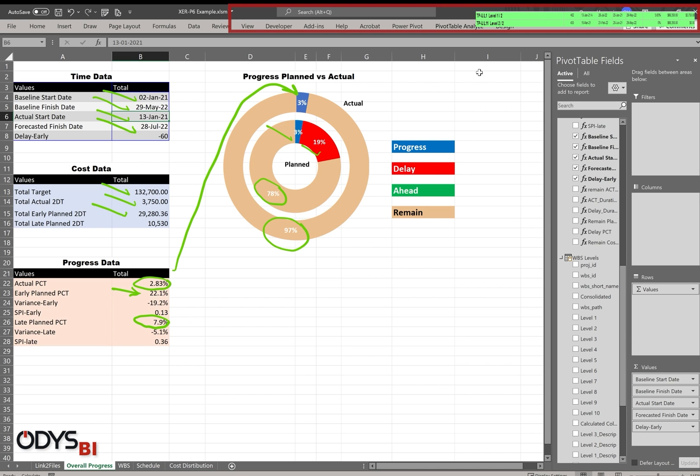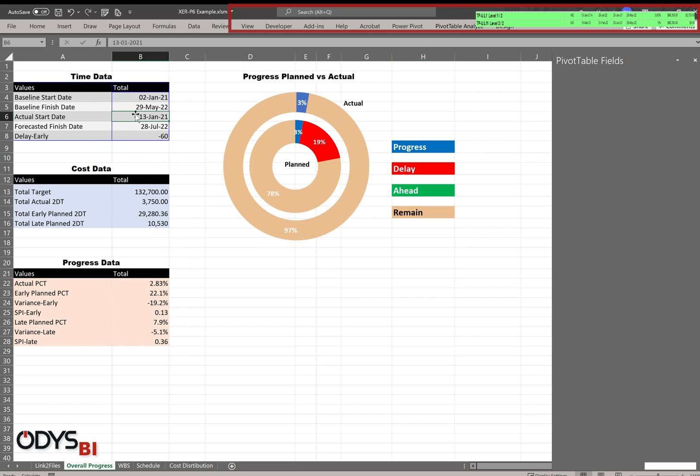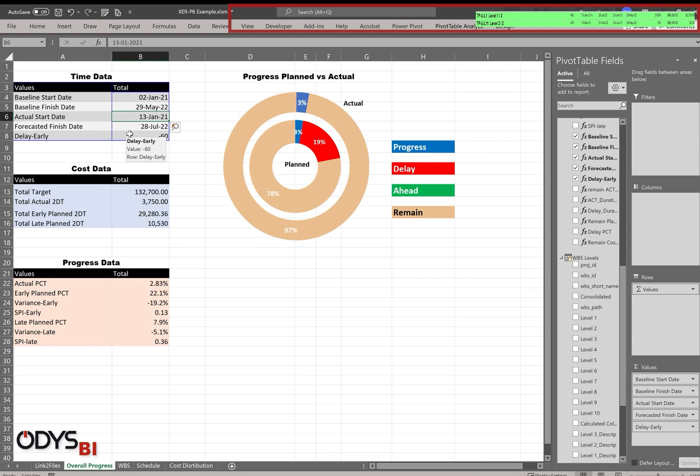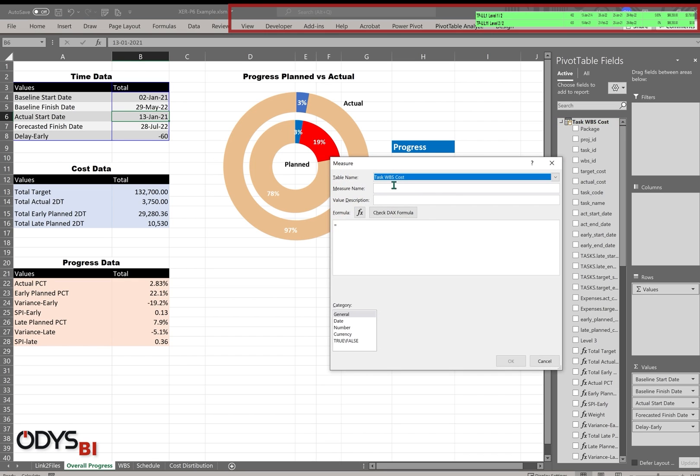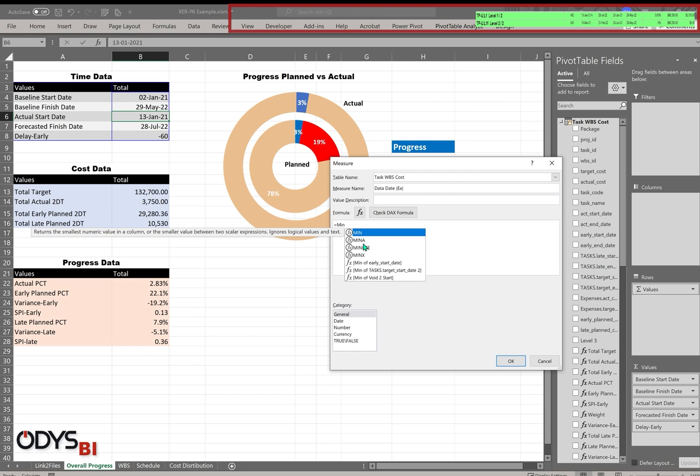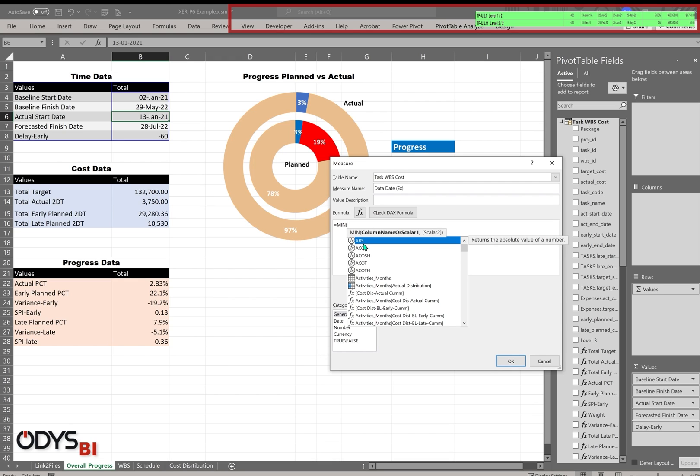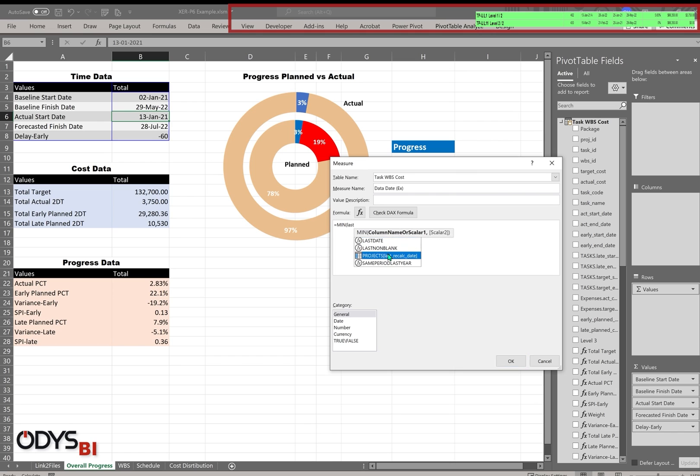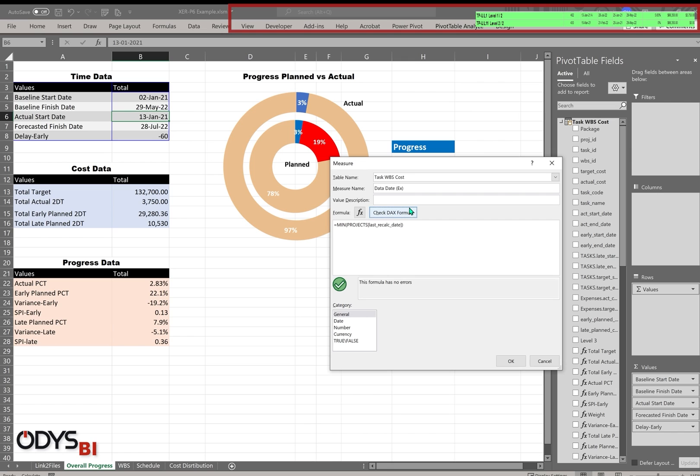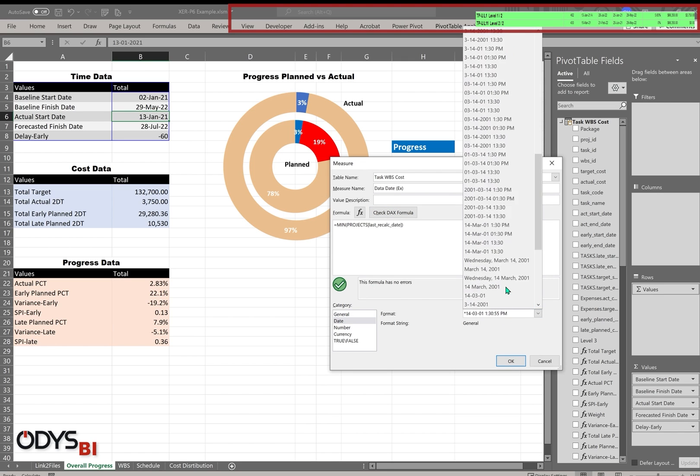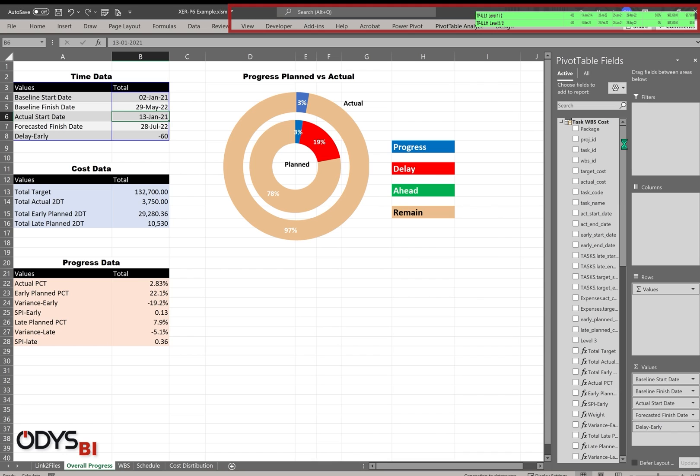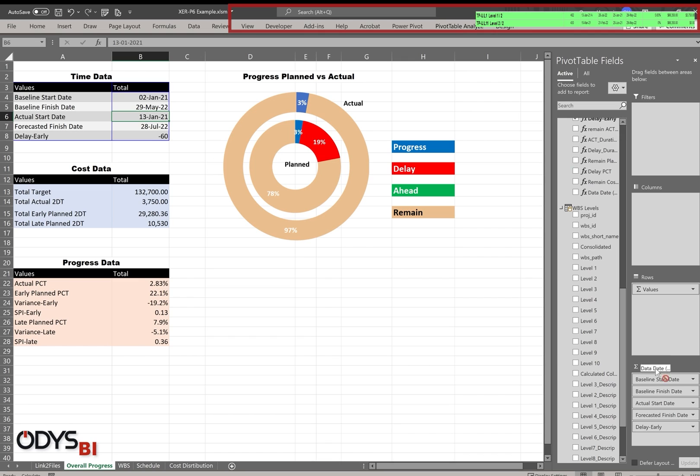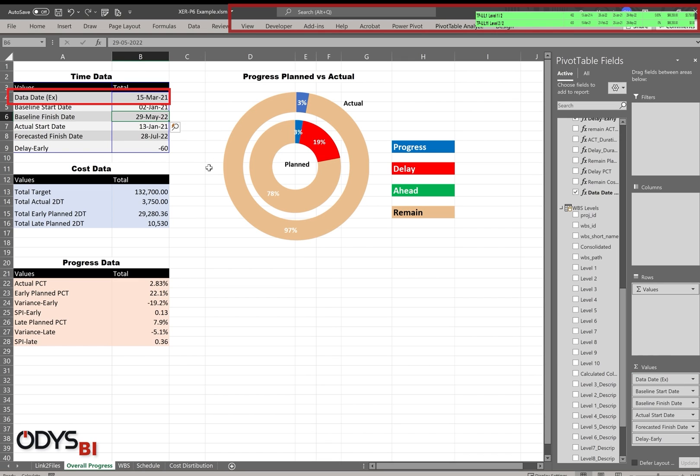Let's clear the sheet now. As you can see here, I have missing data. I want to add the data date. Let me create now the data date and add it to the time data. I'll go to one of my tables and add a measure. I'll call it data date example, because I have another data date. Equal minimum, in Primavera, data date under column called last recalculate date in the project table. Check formula, it is okay. Let's format it as date. Under the same table, I can go here. This is the data date I created. I'll add it to the first value. So the data date added here is 15 of March as per our data.